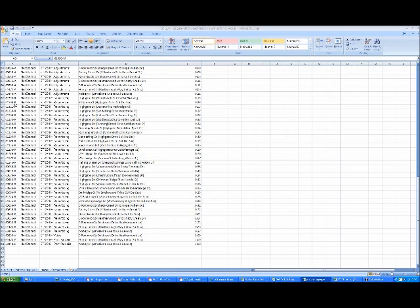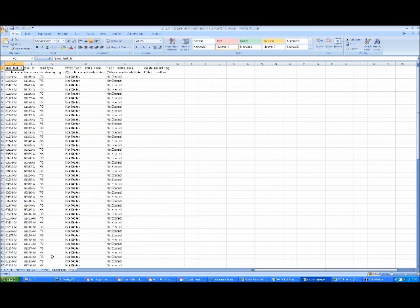Okay. So I was saying that what we did is we loaded the adjusting activity IDs, the resurfacing activity IDs, the video activity ID, and the point repairs. And then the next tab in an Excel spreadsheet that you're going to load into P6 is where you define your relationships. So milling has a finish start relationship to adjustments, and we covered all those in this first set. And then milling of one facility ID has a finish start relationship with the next facility ID in the order that we're going to be doing them.